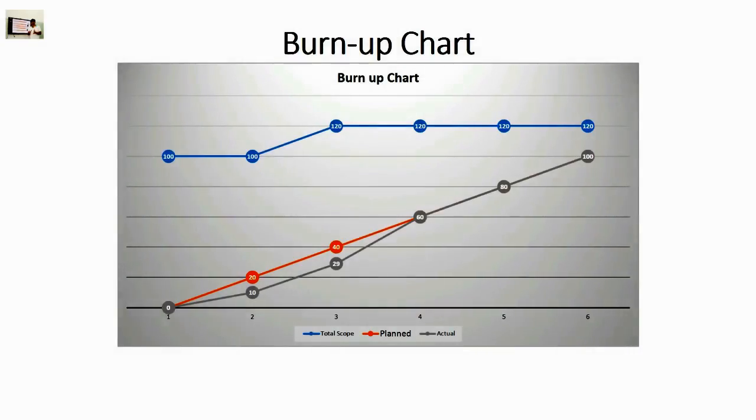Conceptually, there is not a very big difference between burn up charts and the burn down charts. The only difference is that instead of tracking how much work is left to be done on a burn up chart, we track how much work we have completed. So the curve in case of burn up chart goes up not down.